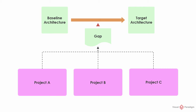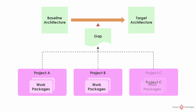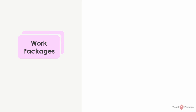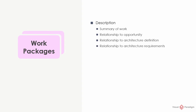But projects can be very big. What you have to do is decompose work into smaller, more manageable components until satisfied that the work is defined at a sufficient level of detail to estimate time, cost, and resource. The components decomposed are known as work packages. For each work package, the following has to be specified. Description: describe what will be performed under this work package and the expected outcome. You may also explain the reason for initiating the work package, the prerequisites, and its relationship to opportunity, architecture definitions, and architecture requirements.